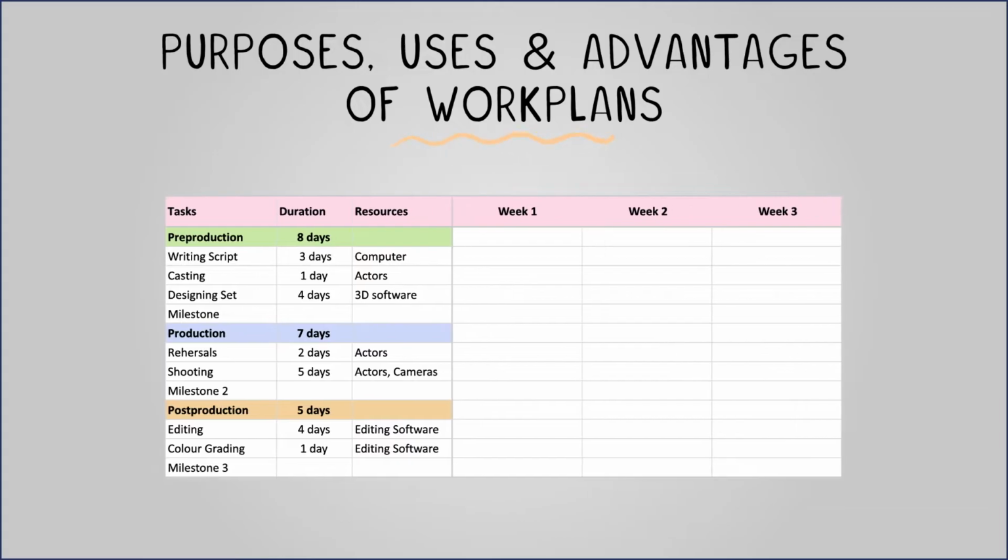Gantt charts are commonly used for work plans as they provide a visual representation of the project's tasks, subtasks, and deadlines. A horizontal bar is drawn to represent each task's start and end date and its length, giving a quick impression of what the project will look like.